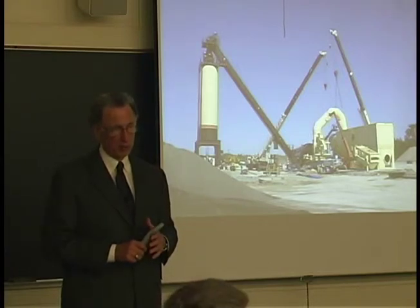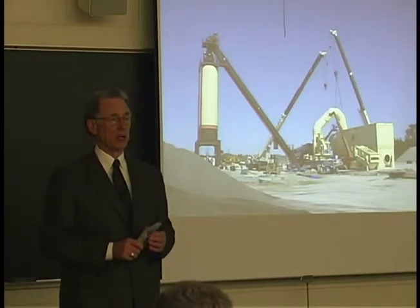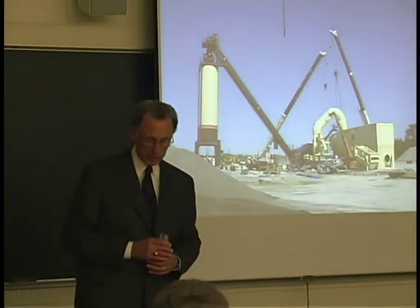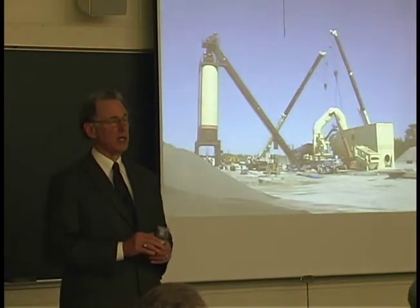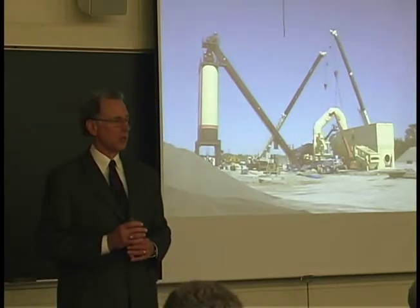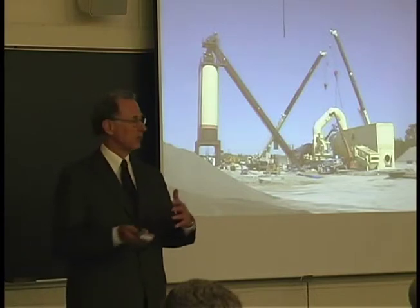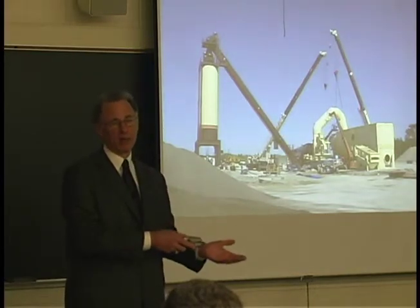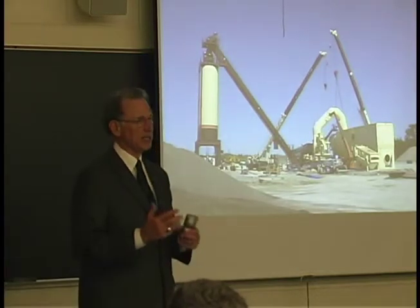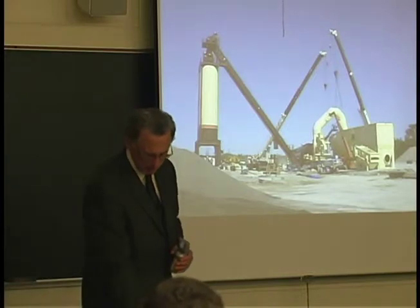The project had penalties of $30,000 a day, and those penalties went on forever. There were incentives of $40,000 a day, but they would pay you for a maximum of 23 days. So, in our way of thinking, if you could be penalized forever, why can't you be paid bonuses forever? But they didn't agree with our thinking. And these are all set up in the contract, so when you bid them, you know exactly what's going on.